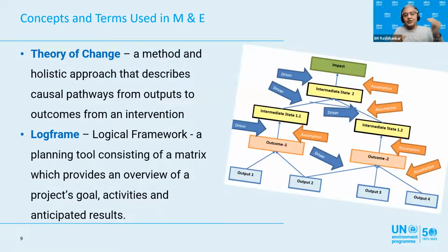And then there are drivers. Drivers means things that governments or communities can do to push this forward. Governments can allow for new houses to be built on previously contaminated land, and they have to do certain things. Those are drivers. So actions are drivers, and assumptions are that certain negative things don't happen in order for this pathway to happen. This is a really interesting concept, and it is heavily used in proposal writing and in preparing a log frame and M&E. So I recommend that you look into it further.